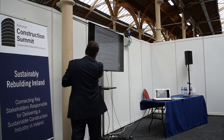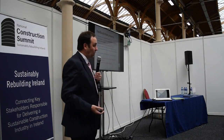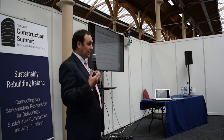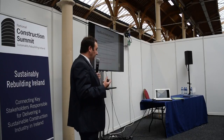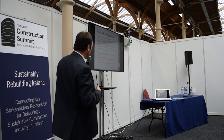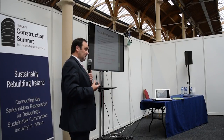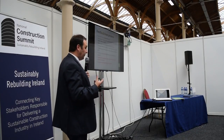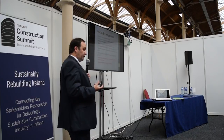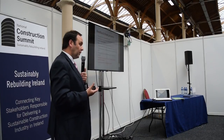However, you can see that there's still some negative feedback where certain people had said that the commissioning process wasn't actually met and there was still ongoing problems, and that's continued. What generally happens in these situations is that clear expectations of the testing and the balancing haven't been clarified right at the outset, and the testing procedure itself hasn't been thorough. Someone had also said that it's a very document-hungry process, and in a sense, for LEED fundamental commissioning, it really is. We would recommend, if possible, if you're going for fundamental, you get possibly 1 credit. For going for enhanced commissioning, you have the ability to go up for 6 credits.